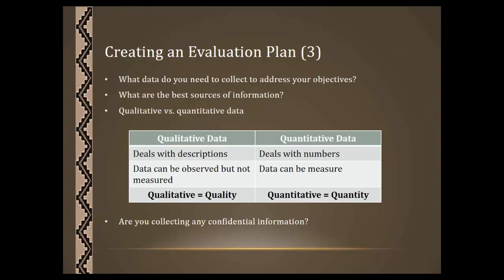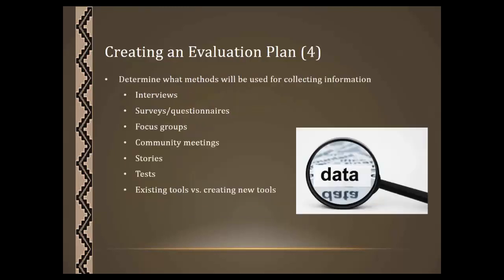One thing to remember is that if you're collecting any kind of confidential information from your participants, ANA requires that you have a plan for keeping that information secure and that you also have a plan for destroying the information at the end of your project.